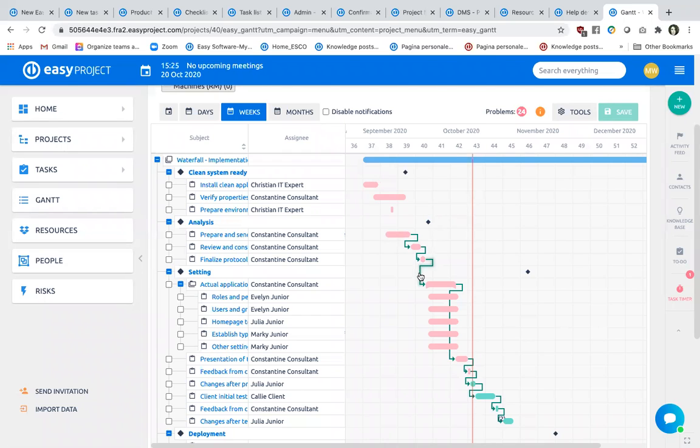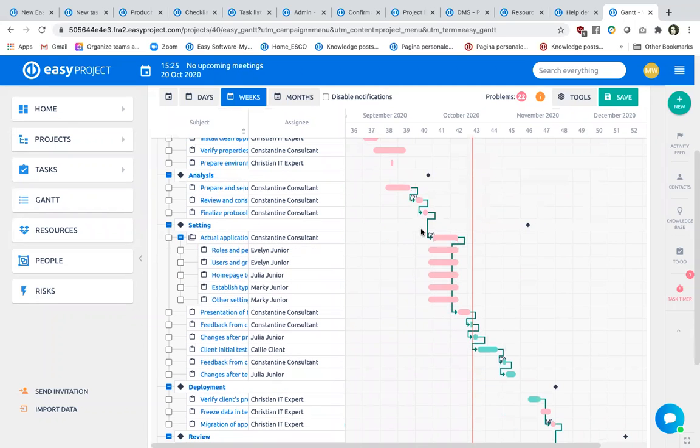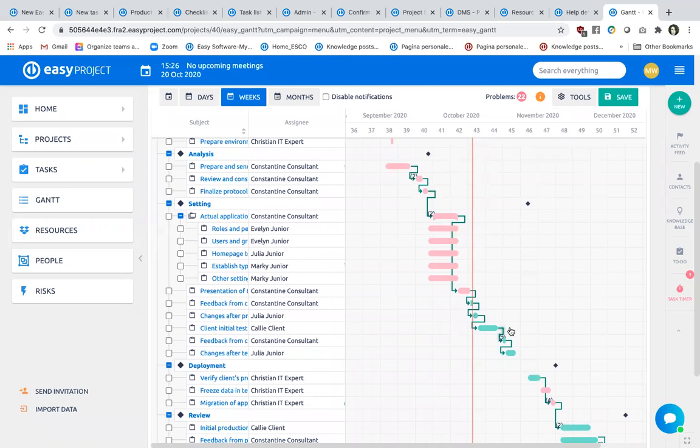So this is pretty much what is new in the Gantt. It's new icons and a better interface. As you can see here, I can extend the task if I want by clicking on these small buttons. Now I'm in the past, so I cannot modify it. But if I go to the future, I can still extend it. And when someone starts notifying the percentage of accomplishment, like this bar, these triangles will move.